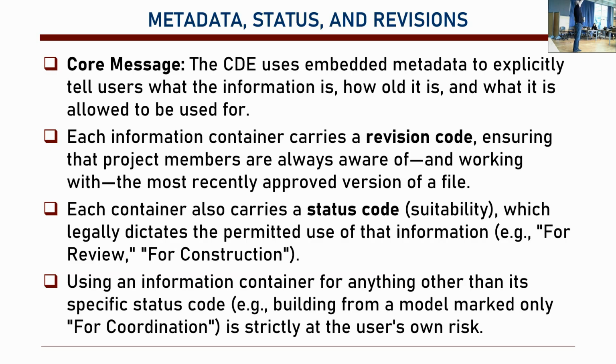For instance, you know that you cannot put a pipe that goes through here. You know that you cannot put an air duct here or a lighting fixture above it. It's because the projector is there for coordination. So this metadata, the status code, is in that regard very important.